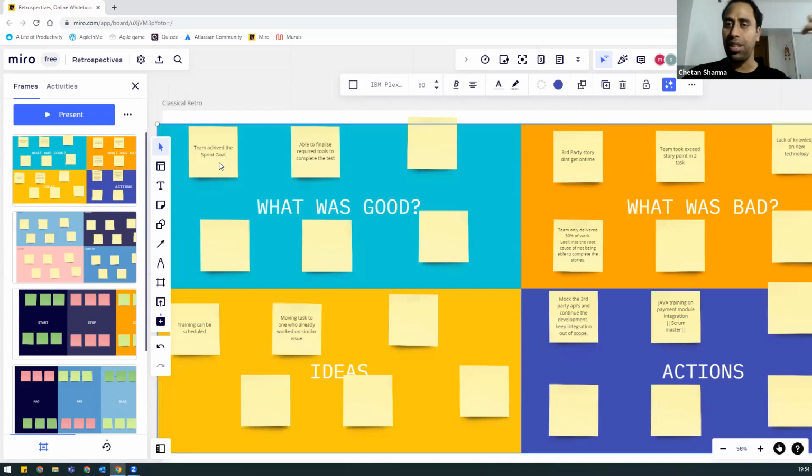You might say, okay, we have three sprint goals, and because you only finished 50%, you achieved one of the goals. But that's not the only thing, right? Your sprint goal is to achieve these three items. So our sprint goal is not achieved. Even if you're completing 80%, you can't say our sprint goal is achieved unless you're delivering 100%, or at least, at a certain level, all the goals you made are delivered.